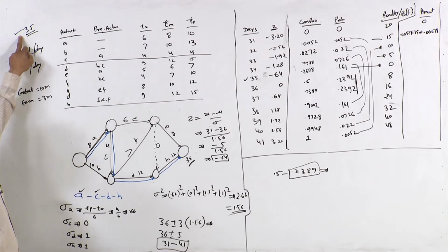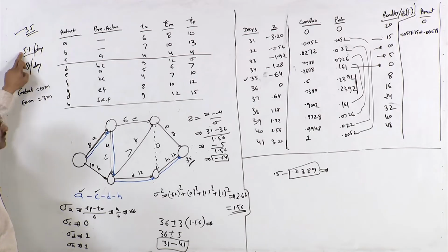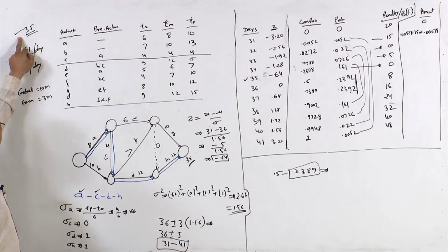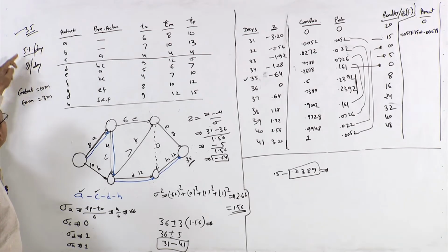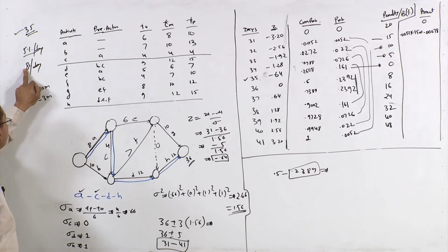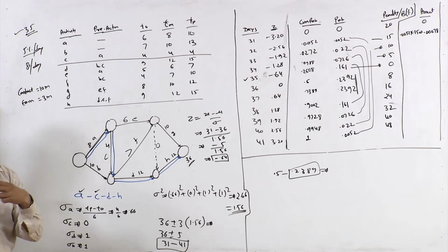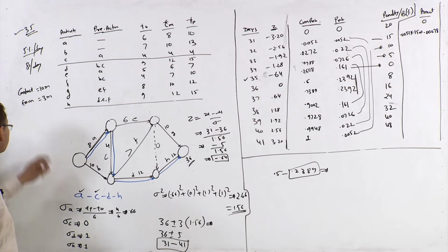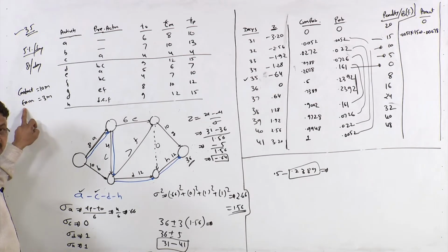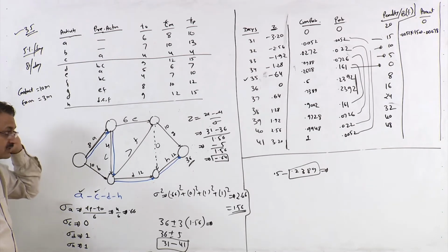Now when you hand over this project to your client, because you have promised to deliver this project to client within 35 days, if you submit before 35 days, then you will get a bonus of 5% per day. But if you do not hand over the project to the client, then there would be a penalty of 8% per day, right. Total contractual amount between yourself and client is 10 million and you are expected to earn 3 million, right.